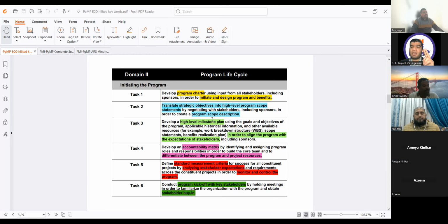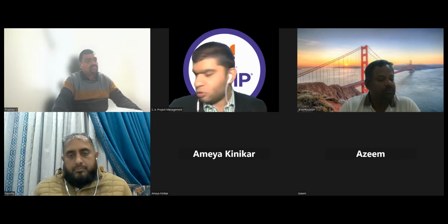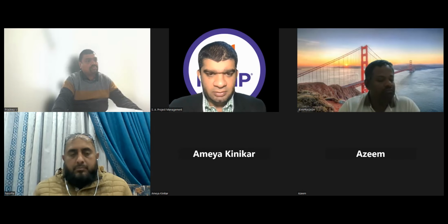Because of the relationship with the realization plan. And I told you today we will study the benefit management domain. Again, I will be covering this topic. Whenever the benefit management plan changes, whenever there is anything going on about benefit delivery, about benefit transition, anything, roadmap and milestone will be updated. That's why I put this question here. So in this case, for the high level milestone plan, we need to have WBS, scope statement, and benefit realization plan. The correct answer is A in this case.